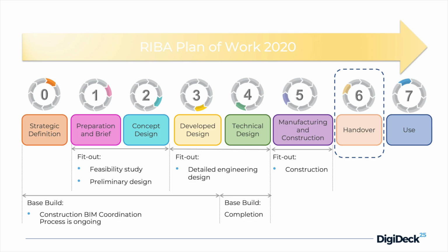The last is the handover stage. What we have here is integration with the FM system, and then as-built information regarding models, drawings, asset registers, any relevant documents. They are being handed over to the client and archived.